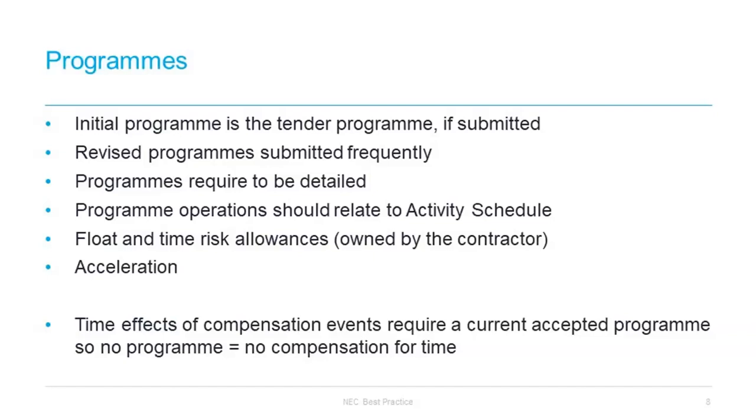It should be noted that building float into a programme is not a reason for the project manager to reject the programme. That is not to say that the contractor would not be under commercial pressure to remove the float. However, you are entitled to resubmit the programme on the basis that a rejection is not valid. And as we're saying there, you can get into quite a grey area where there is no accepted programme and